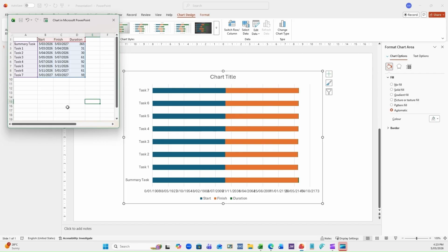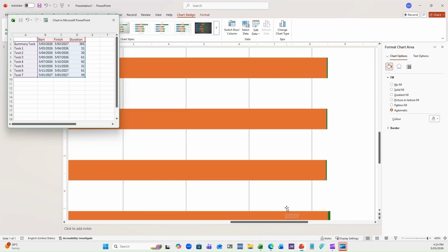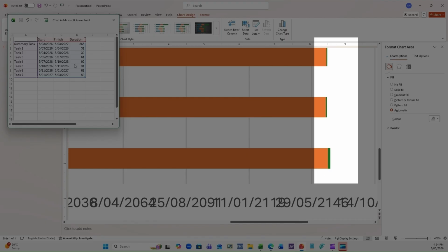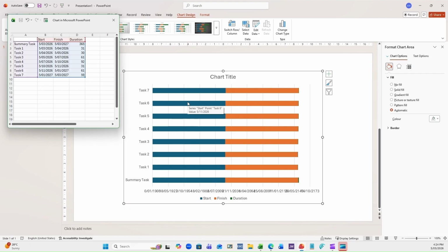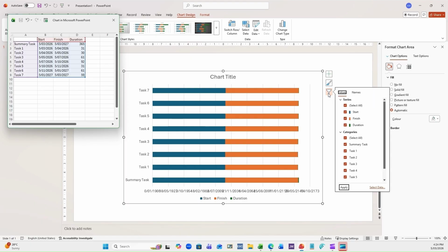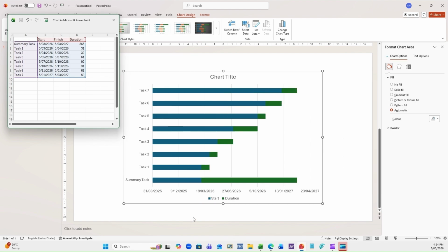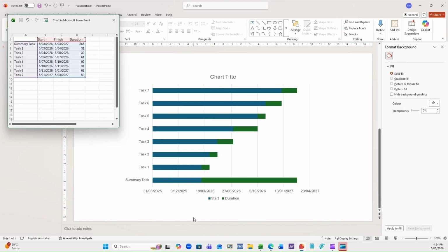Now, we've got the formation here of our Gantt chart, but you'll notice here that it's not really showing us too much. That's because you'll notice that our green data that was formerly on that Gantt chart is largely hidden. That's because it's overpowered by these larger numbers in the blue and yellow. I'll demonstrate. If I zoom in, you can see that these little green slivers are indicative of our task duration, which is what we really want to see on our Gantt chart. So to do that, select Chart Filter and remove Finish Dates and go Apply.